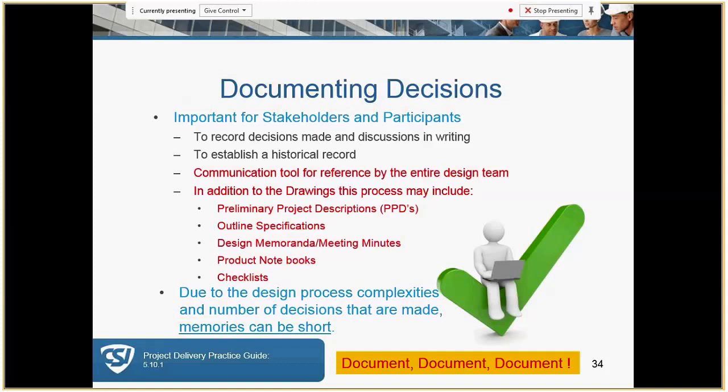Keep in mind that any of those, documenting that to make sure that you have an updated basis of design as you're going through the design process is critical. But I think that's true for any substitution request that may occur or any value engineering. You need to make sure you use a substitution request form and document those changes and acceptance of those.